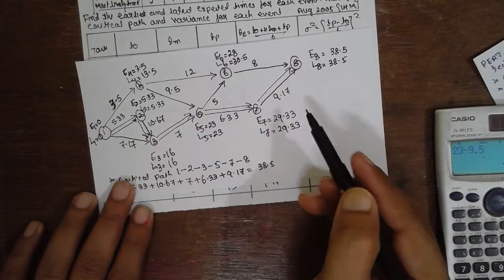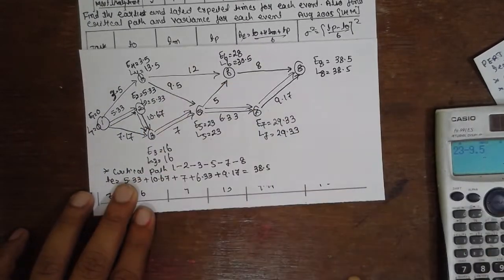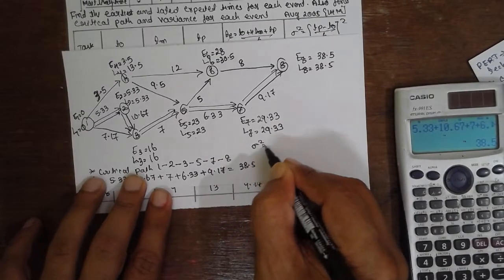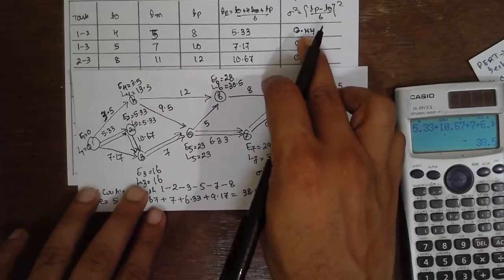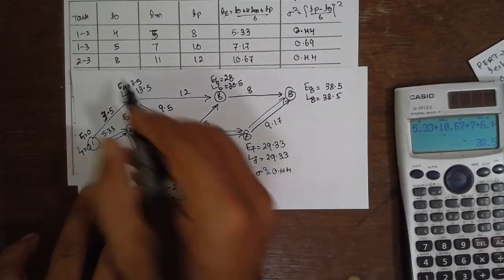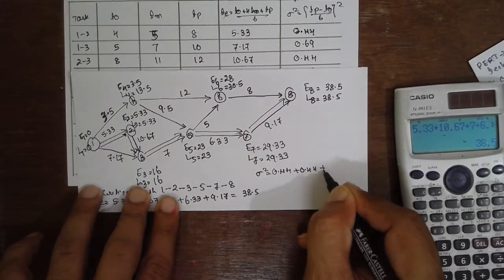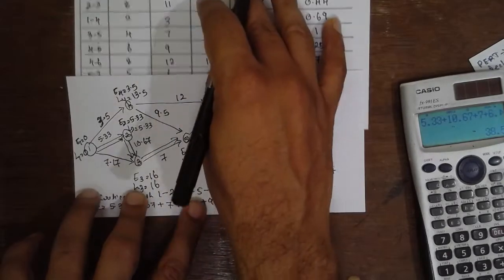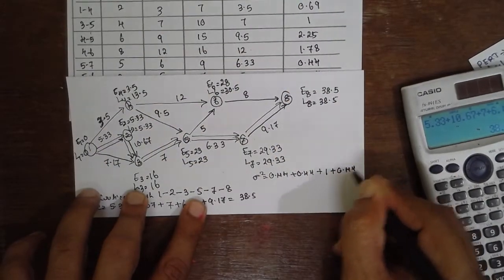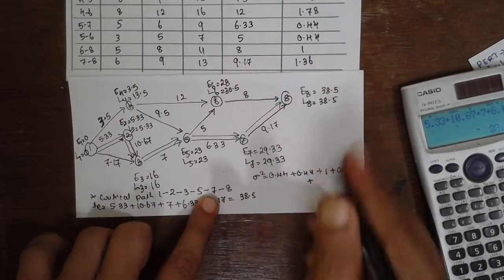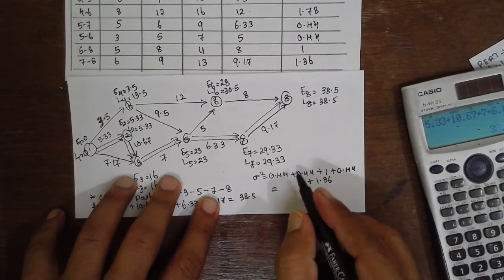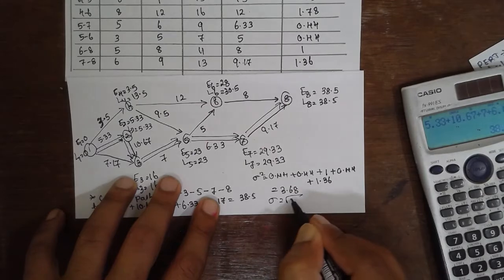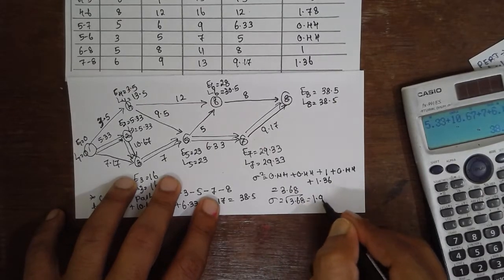Next, find the variance (sigma square) along the critical path. For 1-2: 0.44; 2-3: 0.44; 3-5: 1; 5-7: 0.44; 7-8: 1.36. Total variance = 3.68. Taking the square root gives sigma = 1.918 events.